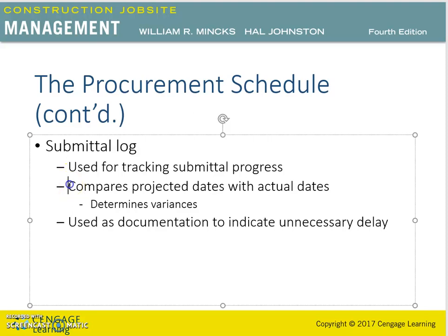So by comparing the actual and scheduled dates in a single form, variances are easily determined. Therefore, the submittal log is used as documentation to indicate unnecessary delay in the submittal process.